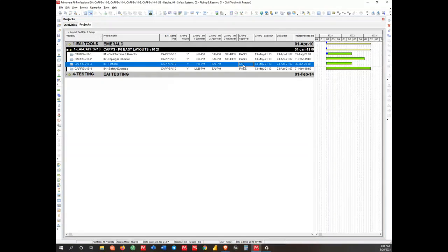So I say that I'm going to accept with the go button, and that will run the changes through. And if all was submitted correctly, it should go to the pass system. Now, some of our clients run the approvals automatically. Okay? And that's also an option. It's a configuration. So you either allow the P6 scheduler to review and set the approval, or you can let it go in automatically. Okay, so very much configurable depending on your particular situation.